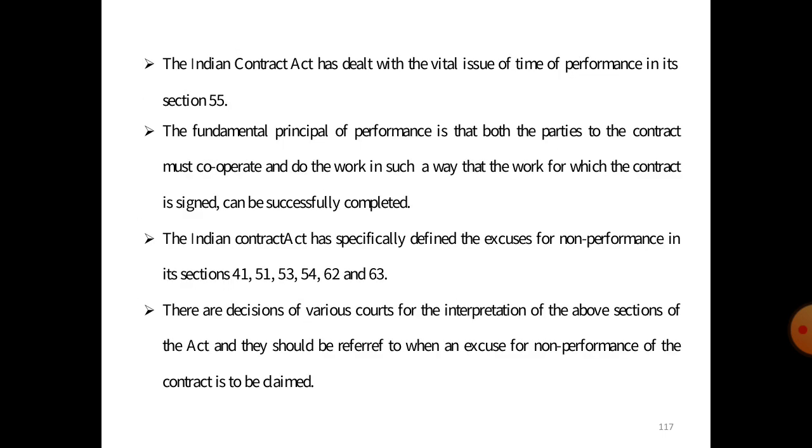Now the Indian Contract Act deals with the vital issue of time of performance in its section 55. The fundamental principle of performance is that both the parties to the contract must cooperate and work in such a way that the work for which the contract is signed can be successfully completed.